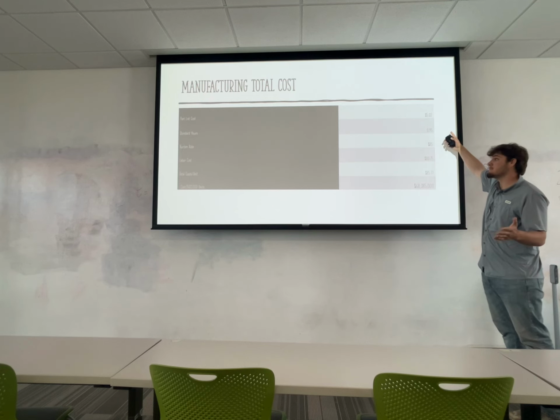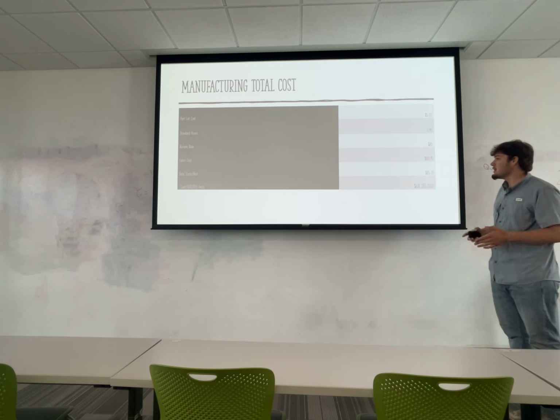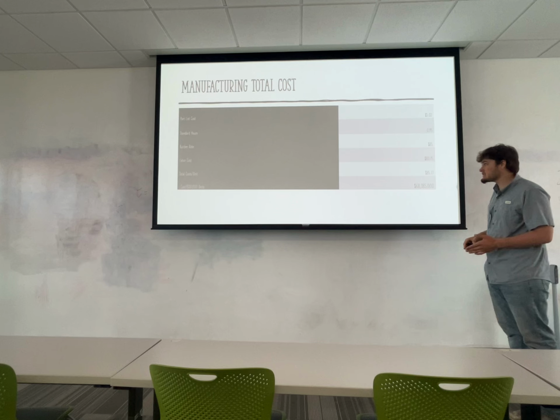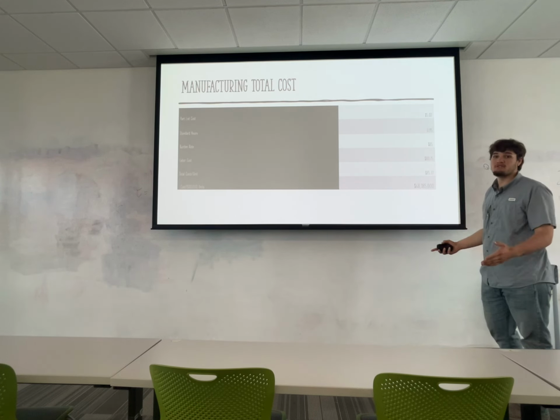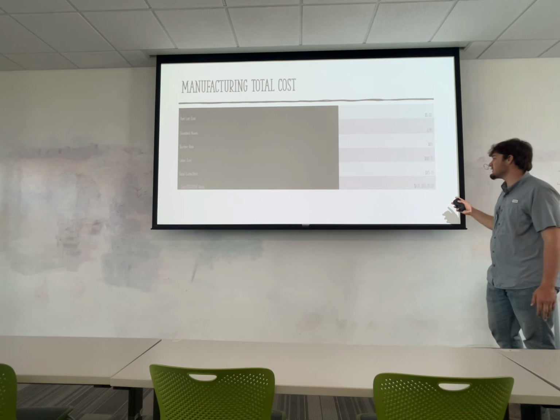for our burden hours, and that at a burden rate of $85, it comes out to $80.75, which then we add with our part cost. That comes out to $85.77. We multiply that by 500,000 units and we get $68,385,000.